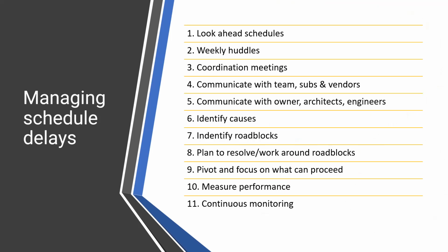Communicating with team, subs and vendors. When we talk about look aheads, the intention is that the project manager and the superintendent on the job are the ones doing the 6 week look ahead, the next week's schedule, and also the huddles. Part of the beauty of the last planner system is to Pareto and look at recurring causes, identify roadblocks ahead of time, and pivot focus. In other words, being able to reshuffle the deck based on what's happening, who can come in early, that kind of thing. And then the measurement is something that we send out every week.